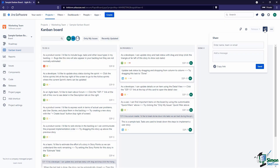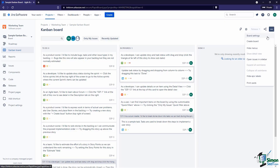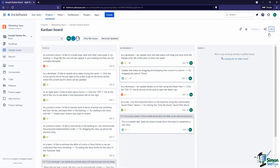Next to Release we have Share, so we can share this board with somebody else on our team. The only thing to keep in mind is they have to have access to the Jira installation but also to the project. If you share it with somebody outside the organization, or someone in the organization who doesn't have access to this project, they won't be able to see this board because they won't have permissions. And here we have the three-dot menu where we can go to the Board Settings, which we'll go into more detail on later.